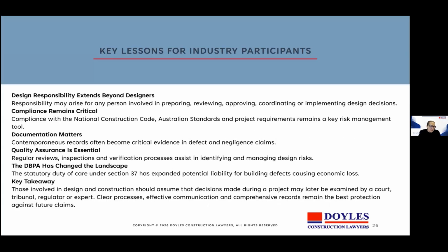So what are the key lessons for industry participants? Design responsibility extends beyond designers. Responsibility may arise for any person involved in preparing, reviewing, approving, coordinating, or implementing design decisions. And so compliance remains critical. Compliance with the NCC, the Australian standards, and project requirements remains a key risk management tool. And contemporaneous documents often become critical evidence in defects and negligence claims.